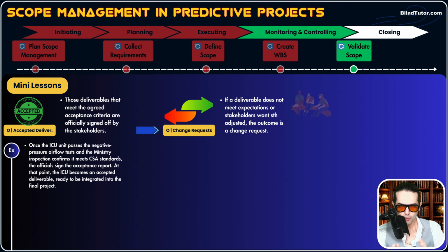We're going to cover it in the integration part of our tutorial, but here, have a short description. Change request is a formal document that our stakeholder or client submits to us, and then we evaluate that change and we hand it over to the change control board so they could decide based on resources, money, time, and so on. This is change request.